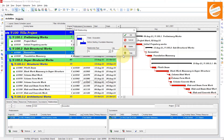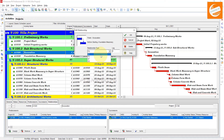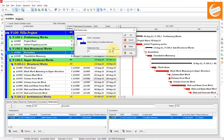You can also add this relationship or change the relationship type — you can change it from here. And if you want to add lag, you can add lag to this relationship. Suppose you want to add 15 days of lag — you can add that easily. After adding or changing the relationship type, click OK.